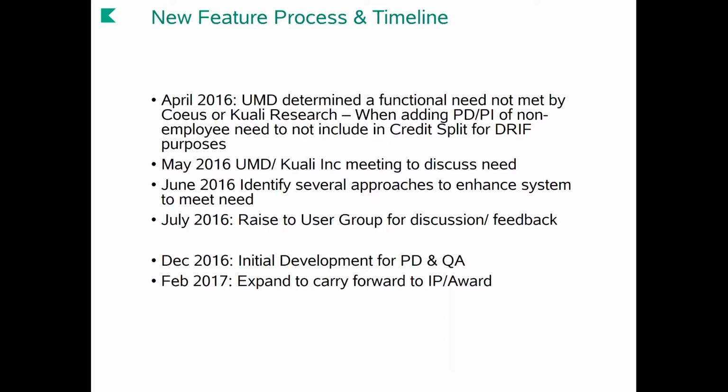And that gets back to that point that you may have customizations. So you want to take Kuali up on their offer for that sandbox so that you can see whether this has already been resolved and is no longer a customization. When it is a customization, go through your change management that says, do we really need this? If the answer is yes, then you come into this process and work with Kuali and say, we can't live without this, and then you'll follow this other path here.